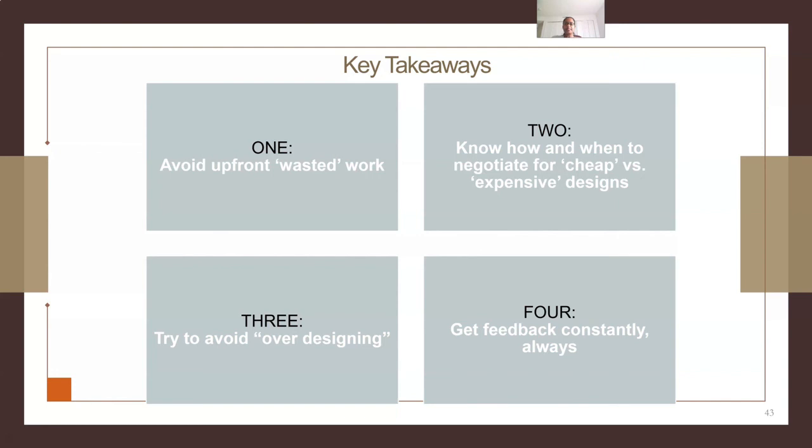So, when I previously said that return on investment is very high, or one of the major advantages after using Agile methodology, what exactly did I mean by that? The early and frequent delivery of working solutions improves the return on investment since it reduces the elapsed time between investing in a development effort and delivering the results. It also gives us the ability to evaluate our ideas by testing the working solution in the real world environment.